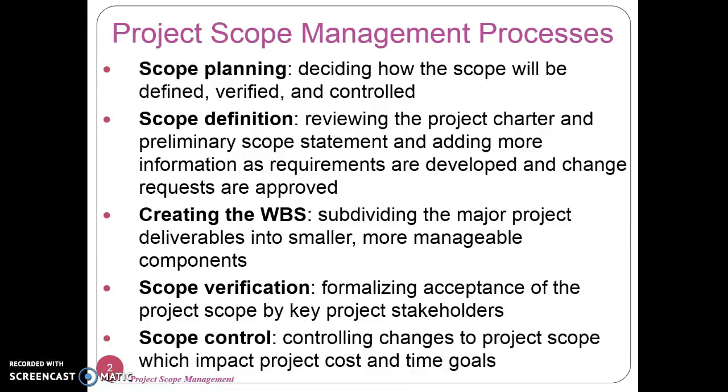Same, we have scope verification. It means we need to understand how our project must be verified by the stakeholder, the project client stakeholder. Scope control is very useful. The reason is, first we decide the project scope, whether 10 units, but somehow tomorrow the scope gets increased and the control also gets increased. In that case, our cost of project and the time to complete the project must increase with some fluctuations, right?